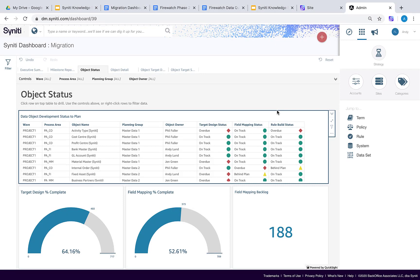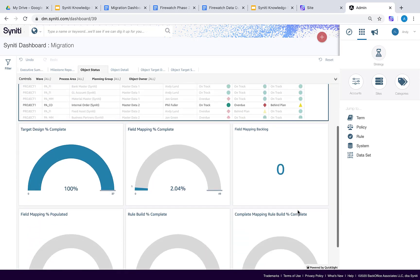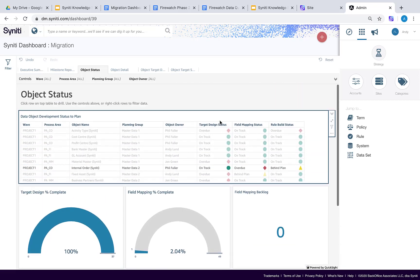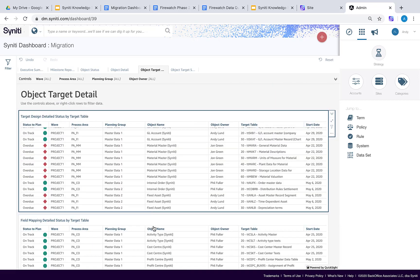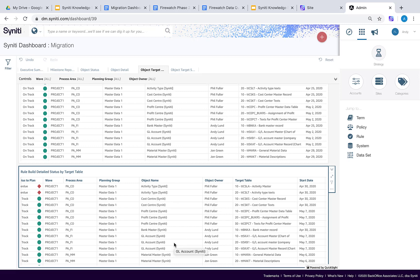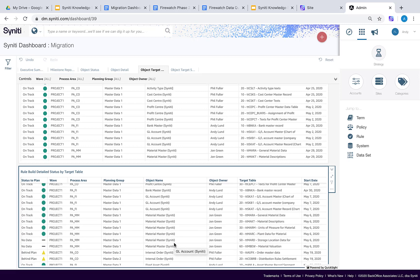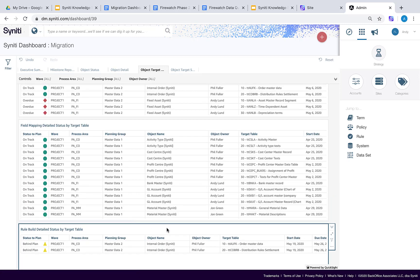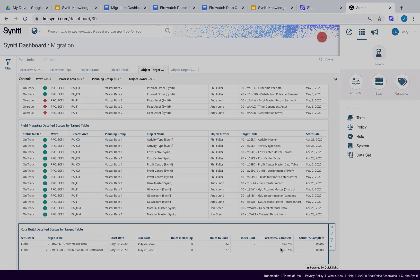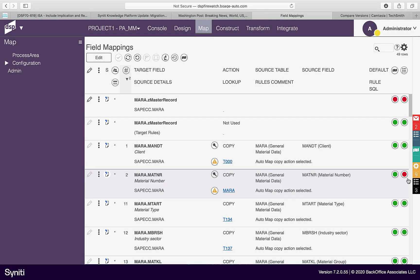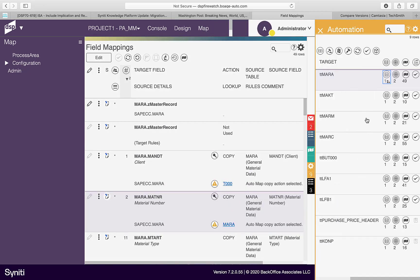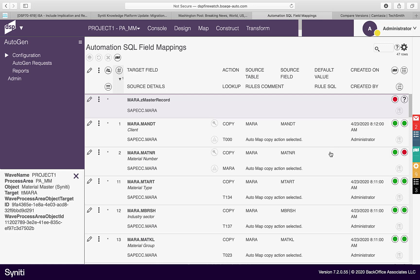In our last example, the rule build status to plan for internal order is showing as being behind plan. By drilling down into the table detail, we can see the build start and due dates. These dates are used to calculate forecast percent complete based upon how many build days have passed. Rule build metrics are driven based upon rule status in ADM. While building the migration solution, developers should ensure that the automation tasks are run to create the rules that will transform the data, and that manual rules are created and their rule statuses are updated accordingly.